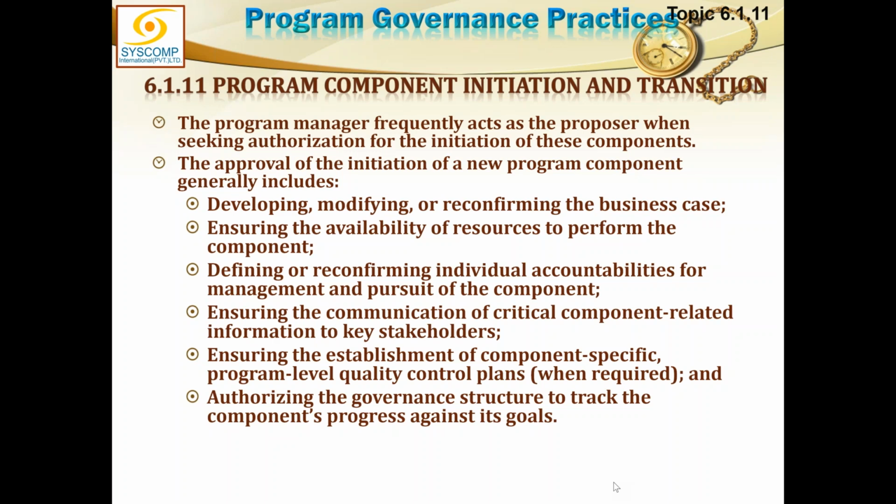Number one, developing, modifying, and reconfirming the business case. This is not the business case of the program. This is the business case of that component, of that project. Number two, ensuring the availability of resources, because these resources are to be provided by the program to the project. So program will ensure availability of resources to perform that component.